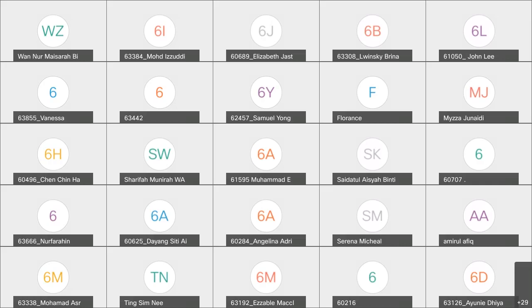From your scheduling, you need to produce a Gantt chart, and then do at least a CPM map out on level 1 activities.